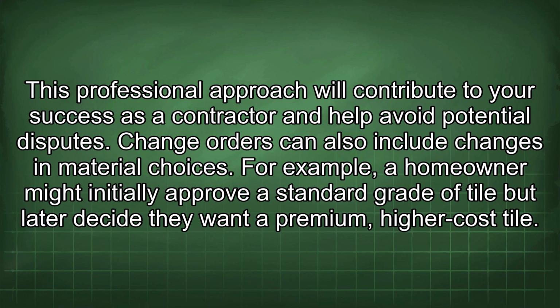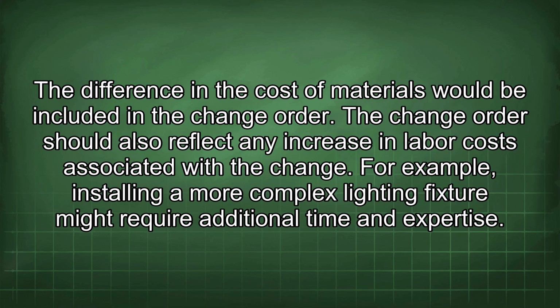Change orders can also include changes in material choices. For example, a homeowner might initially approve a standard grade of tile, but later decide they want a premium, higher-cost tile. The difference in the cost of materials would be included in the change order.